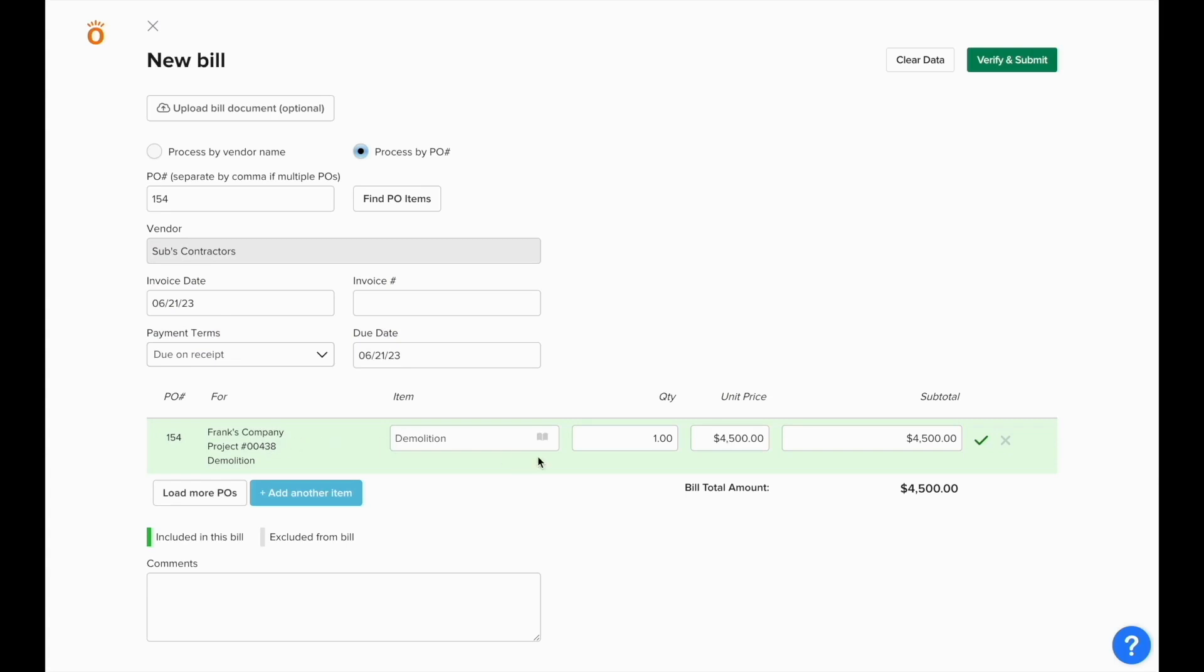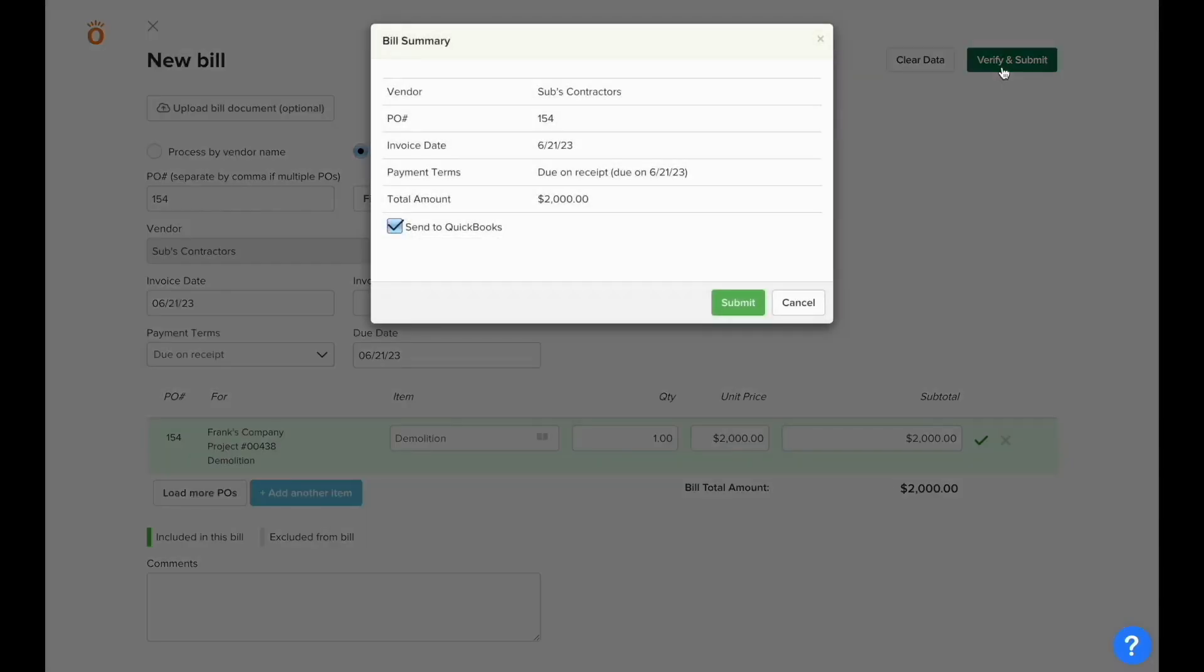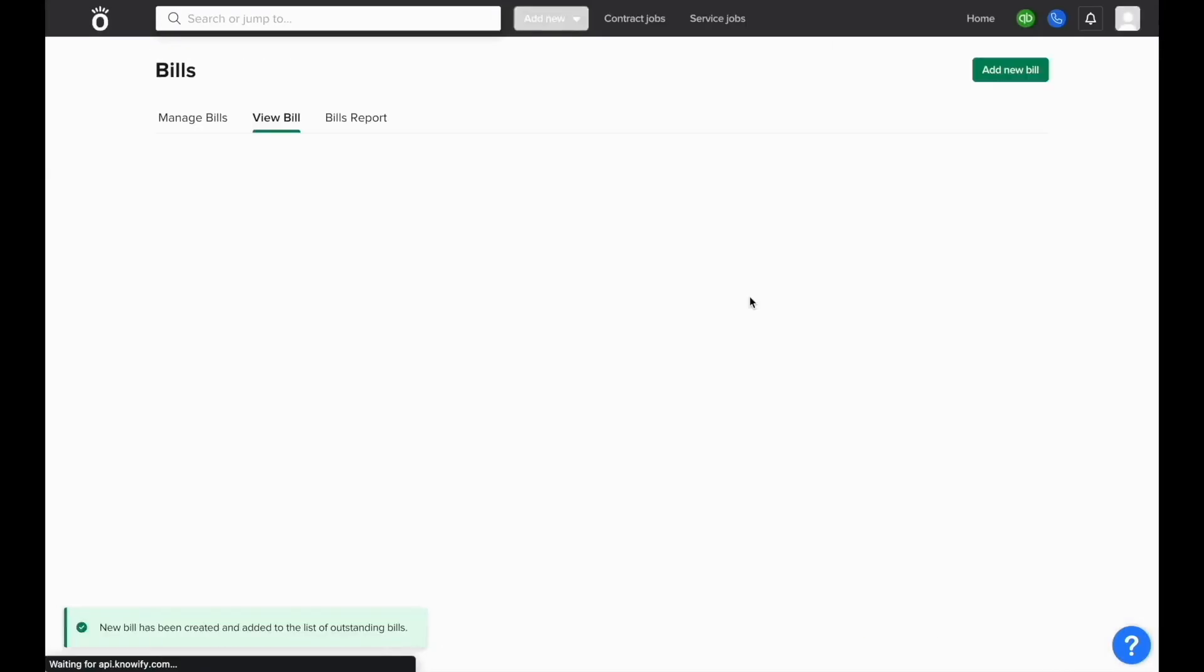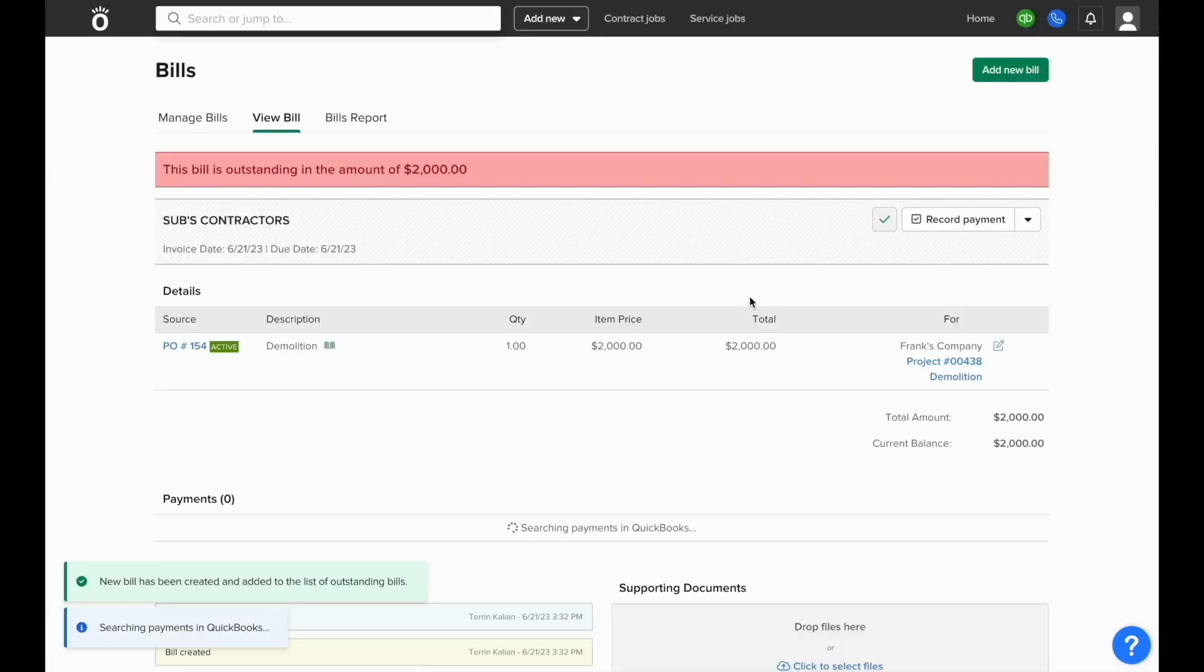Knowify will remember the outstanding balance of the contract so you can key in how much is being billed in this period and the next time you log a bill, it'll know the new balance based off of how much was billed versus the total contract value.